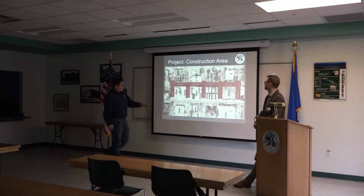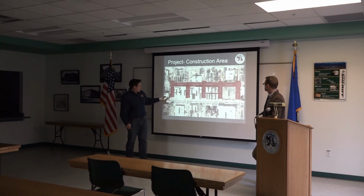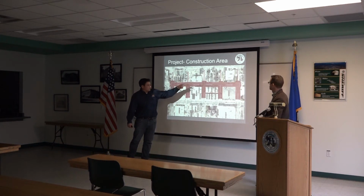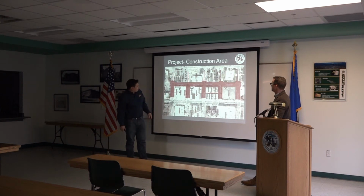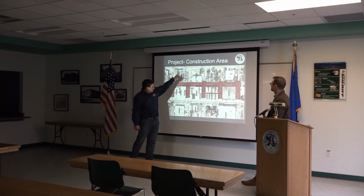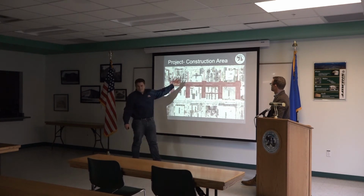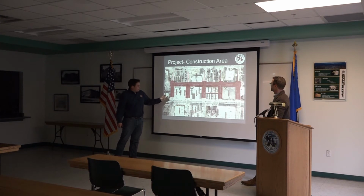So you can kind of see these are the impacted areas. This is Curry Street, Carson Street, Mustard right here. So the water main will go first, and it goes from the south to the north, block by block by block. And then we'll come back and do the sewer up Mustard, up Proctor, up Telegraph, up Spear, and up Robinson. I'll give you a visual there. And then the curb and gutter removal and the sidewalk improvements will probably chase that as well.